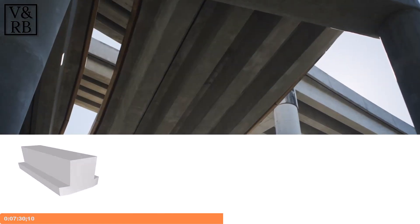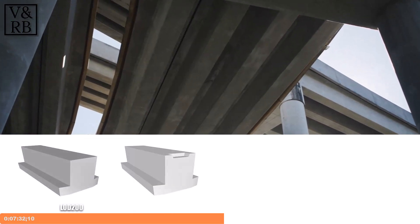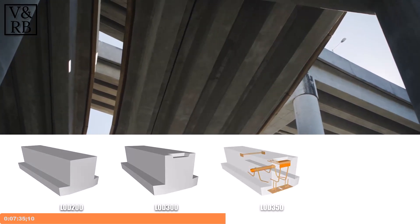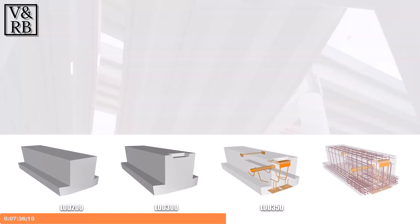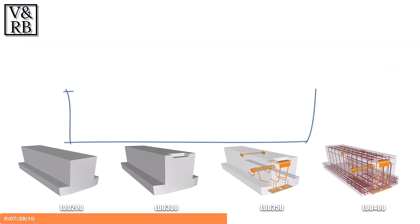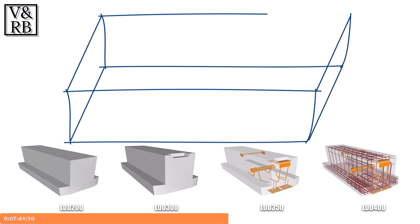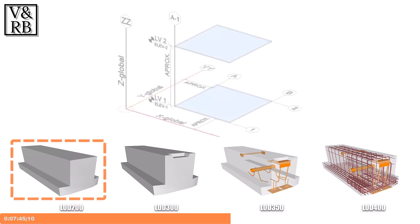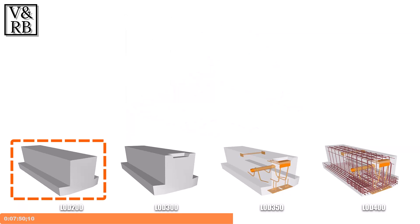Using precast concrete T-beams as an example, the BIM Forum's LOD spec expresses the LOD progressions as follows. LOD 100 may have the beams represented by a generic spatial zone modeled to their worst-case depth. LOD 200 has the structural grids defined accurately, and the structural elements are modeled with approximate worst-case dimensions.